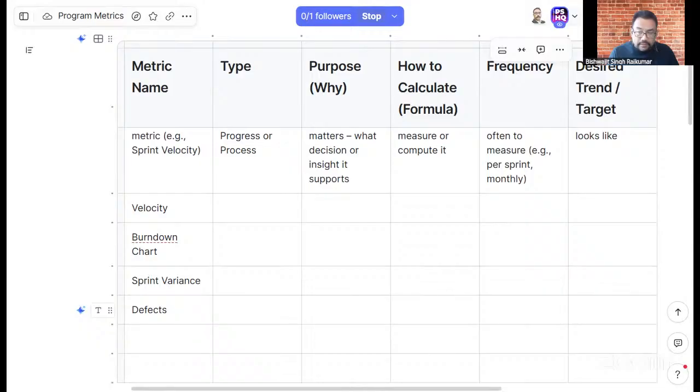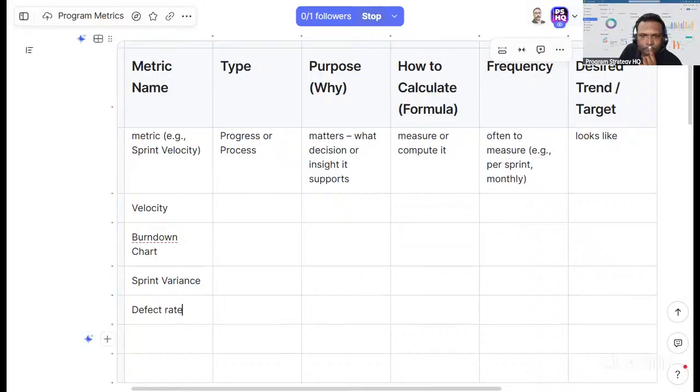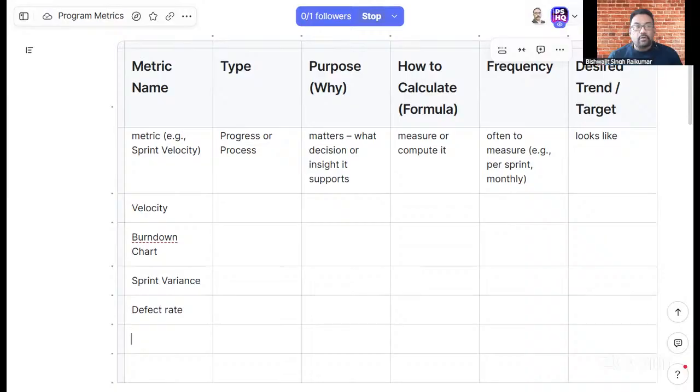Production defects for us happen mid sprint, so we always have reserve tickets for such emergencies so that it doesn't impact the sprint velocity. If there is a lot of spillover, we try to control the spillover.